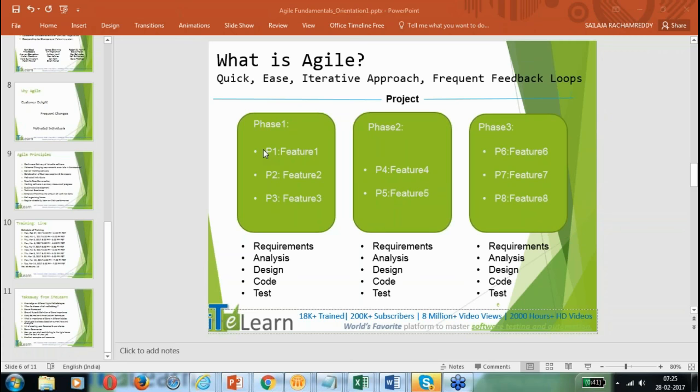Yes, so these are the different methods that we have in Agile. So Scrum is where you have a time frame. It runs in fixed iterations, which is like 2 weeks or 4 weeks or something like that. Once it is decided as a team, we as a team will work for a 2 week sprint. That is, every 2 weeks you will have the workable software and the demos will happen. There are different ceremonies which we do in Scrum. Let's see what Kanban is.